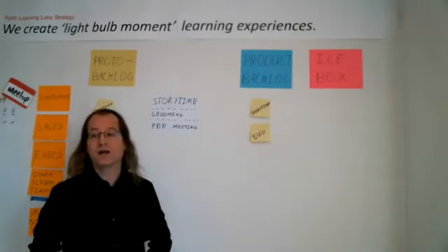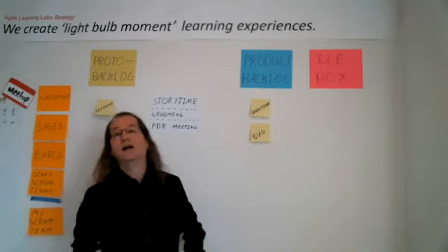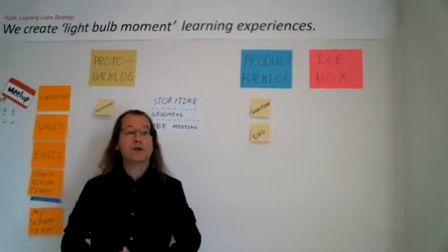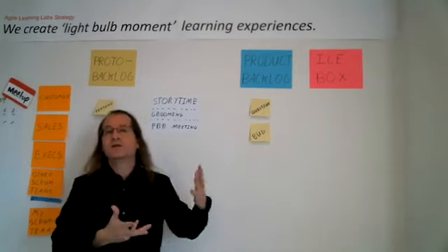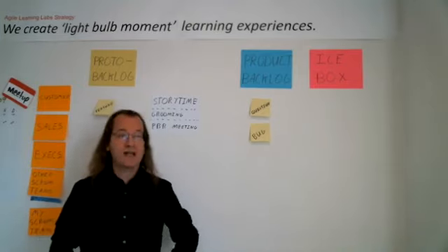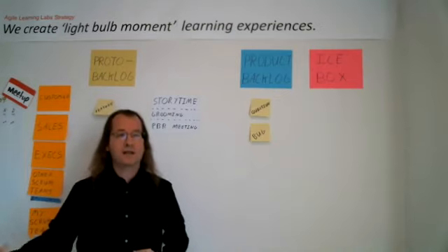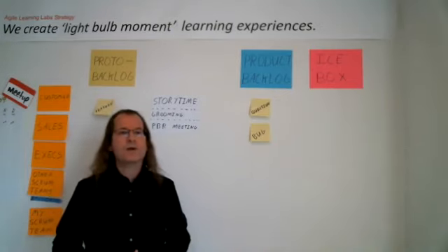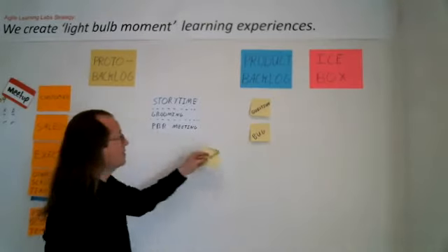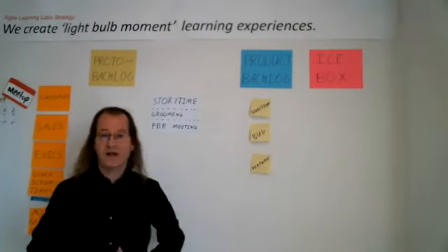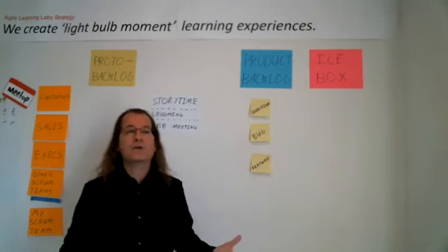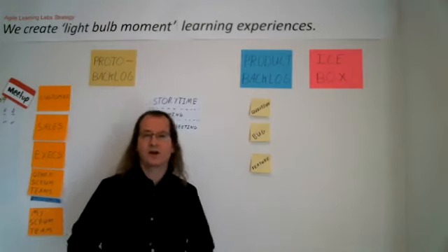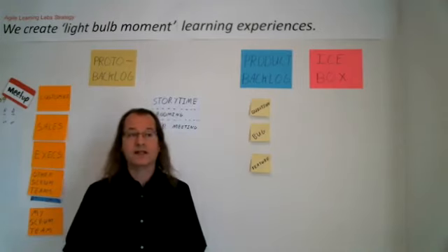The product backlog is the ordered list of the things we're going to ask the development team to do at some point in the future. So great, right? These are the things that ultimately may come into sprint planning meetings and get committed and developed and delivered in sprints. Well, over time, we tend to have more and more things making their way into this product backlog, very often at a rate faster than the development team can get things done. And so what do we do with that bottom part of the product backlog, right? That part that it's like, oh, we're probably never going to get to that.